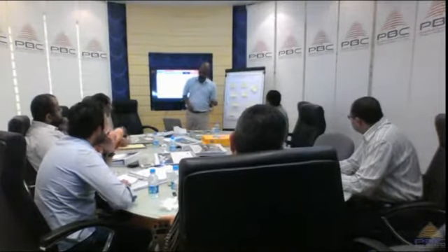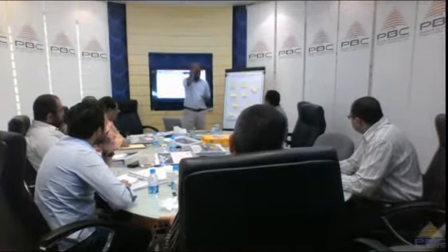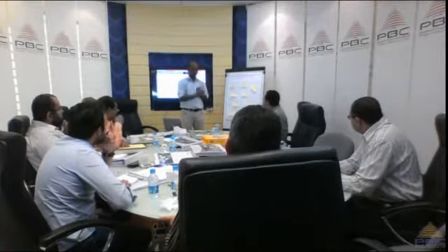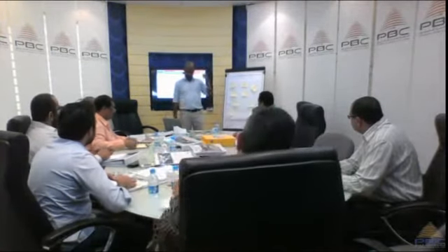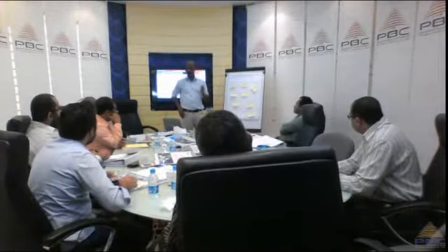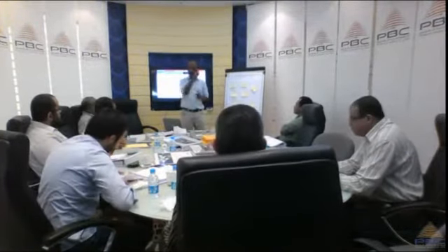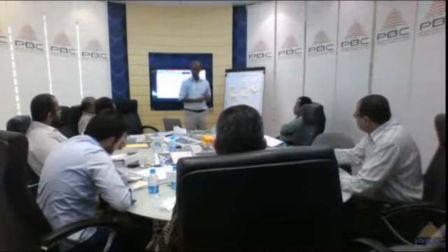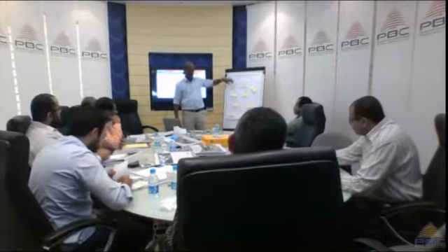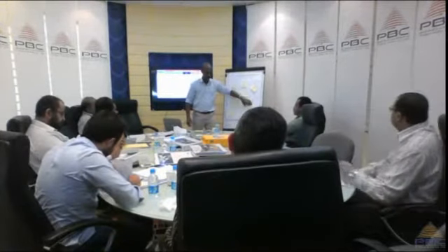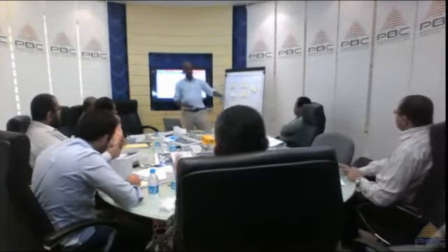Positive risk strategies is looking for positive opportunities in the project. So what are the 3 strategies for positive risks? We have 3 strategies for positive risk. What are they? Increase the probability, enhancement. And the other, increase the impact, exploitation. And the third one is risk sharing. Right? These are the 3 positive risk strategies.